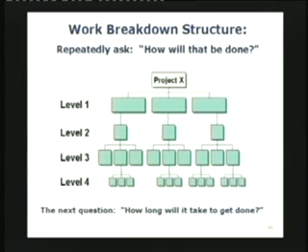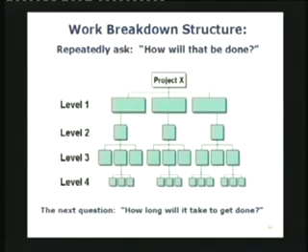They will have the major deliverables. So to build the bridge, I've got to have the pillars, I've got to have the spans, I've got to have the road approaching and road going out. And for each pillar, I've got certain other things to do. So you basically ask the question, how am I going to be doing the project? I need A, B, C. How am I going to be A? I've got to have this other thing D in place. How am I going to be D? I've got to have D1, D2, D3. And these things come from experience.